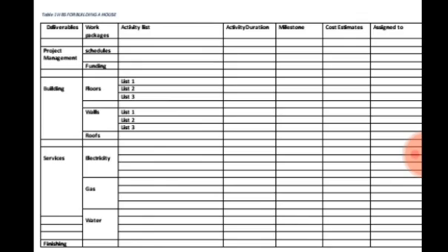Then what is the milestone? It means we now say, okay, the milestone will now be from 6th of June to maybe 9th of June. You understand? You state it there under the milestone. Then how much is it going to cost? The laying of these blocks to the DPC level. How much is it going to cost? You state the cost there. Then who is going to be handling it? You also state it under the assigned to.